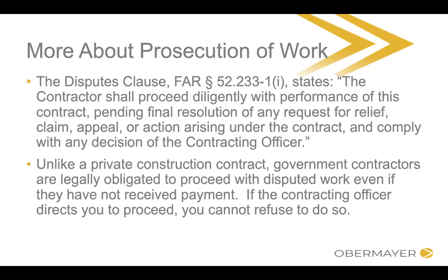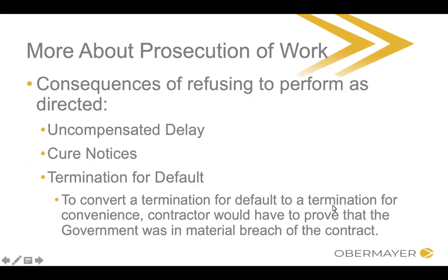So you need to continue doing the work and worry about arguing it on a side track, parallel track, or on the back end once you're done. If you refuse to proceed, or if you refuse to proceed without payment, you absolutely are in danger of being terminated for default. So like I said, consequences of refusing to perform as directed.